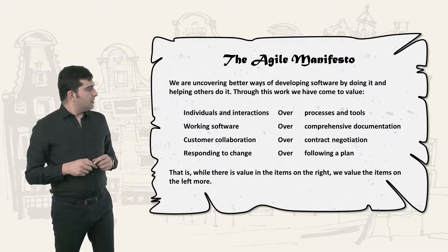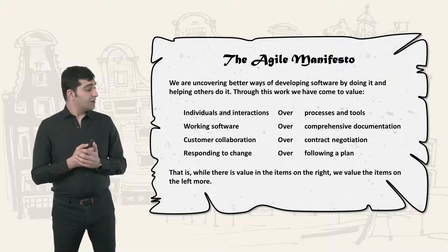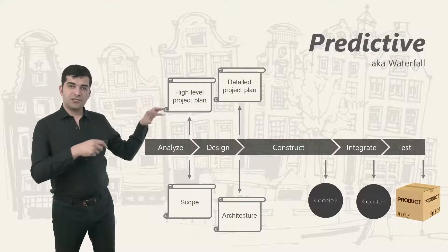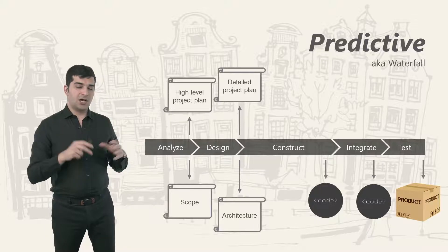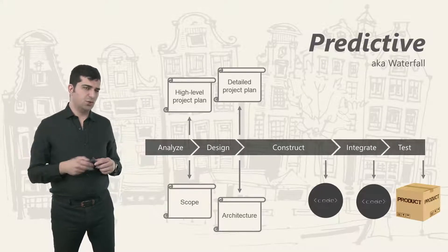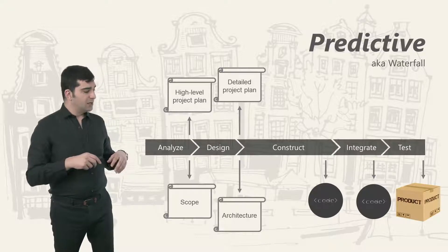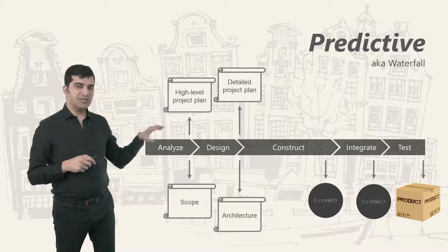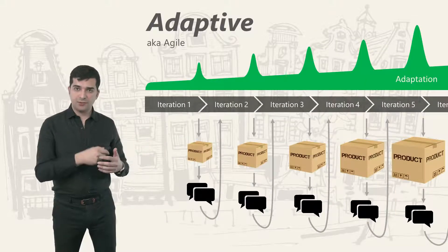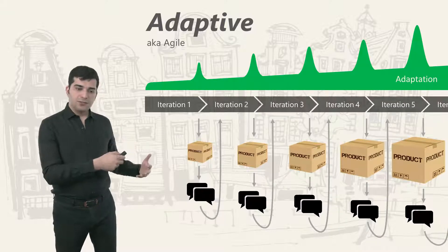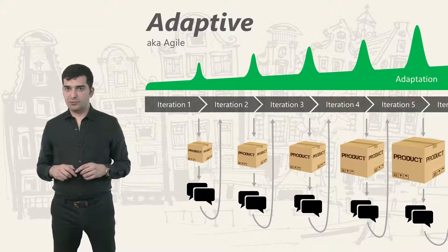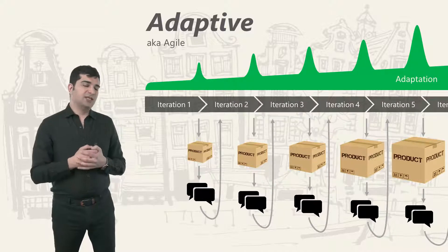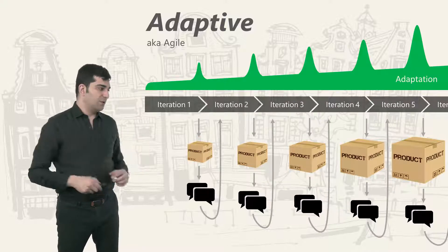The second value is that we value working software over comprehensive documentation. In a predictive system, we have an upfront plan, upfront design — all of that is documentation. We try to understand what we need in the project and then create it. But in adaptive systems, instead of using comprehensive documentation, we go on with the project, adapt to things, and the way we adapt is by creating working software, showing it to the customer, receiving feedback, and using that feedback to decide what to do next.